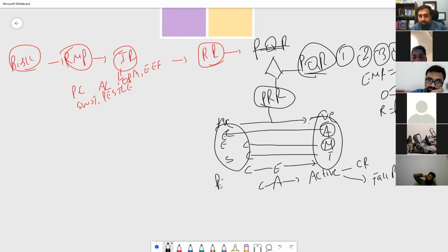Then we have passive acceptance. Yes, we have identified the risk, but we don't act on that risk. And if that risk occurs, basically we use management reserve for that, and we do a workaround. Passive acceptance is for the identified risk, and for unidentified risk like emergent risk, it's the same thing. We use management reserves. So once your plan is done, you give it for approval to the management. Once they have approved the plan, all the other plans are updated because of that. So that happens in the planning phase of risk management.